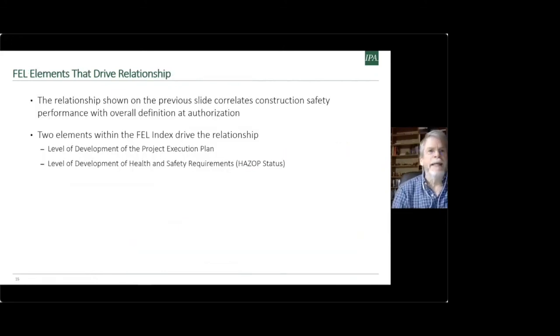Now, when I look at the data in more detail, I can see even in more granular because the relationship that I showed on the previous slide correlates overall construction safety performance with that overall definition and authorization in that single metric, that FEL loading index. But there are two particular elements within the FEL index that is the main driver of this relationship. When you break it down statistically or do some sort of more detailed statistical analysis of the elements of front-end loading, the level of development of the project execution plan, which you may recall are things around the level of definition of the schedule, how well and defined is your contract strategy, your turnover sequencing, your commissioning and startup plan, your design plan, how well are those comprehensive plans and detailed schedules developed as we get to authorization is one of the strong leading indicators of ultimately construction safety.